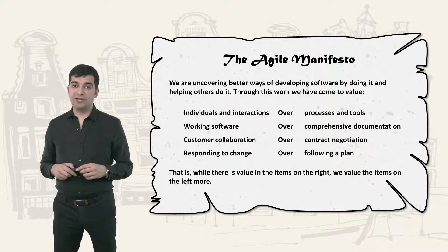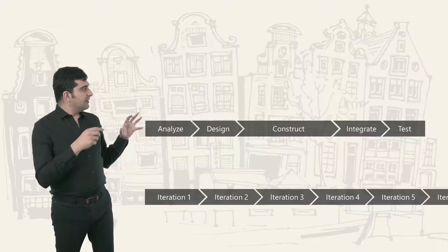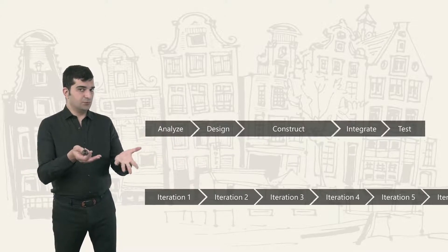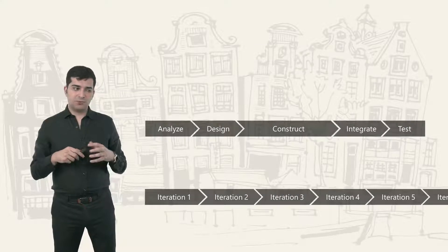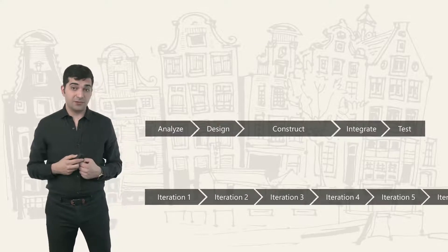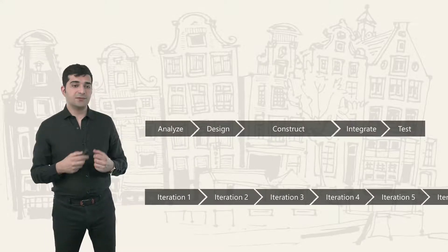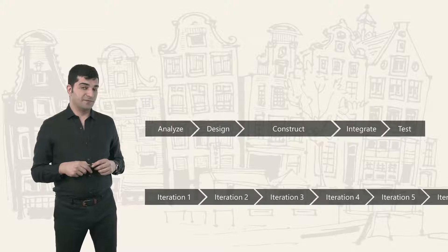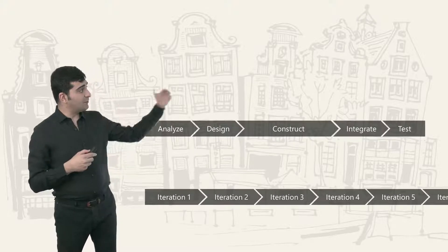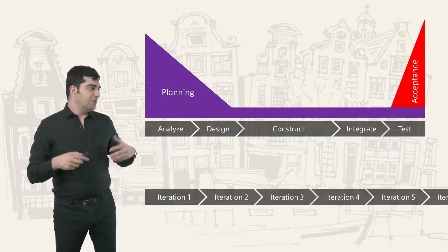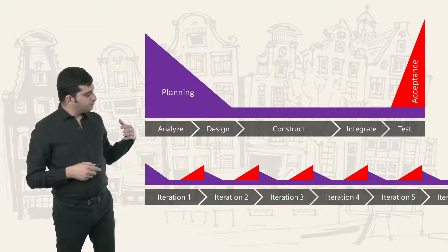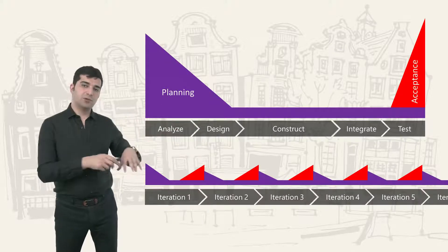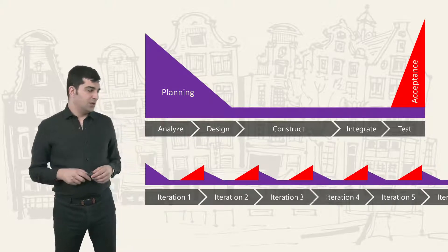The third value is customer collaboration over contract negotiation. In a predictive system, we usually don't have increments during the project, so we don't have something to show the customer. We have deliverables, but most customers don't understand or can't experience them — and end users, who are a great source of feedback, certainly can't. So all acceptance happens at the end of the project, leading to many problems. But in adaptive projects, it's done in every iteration — gradually, but more prominently at the end of each iteration.